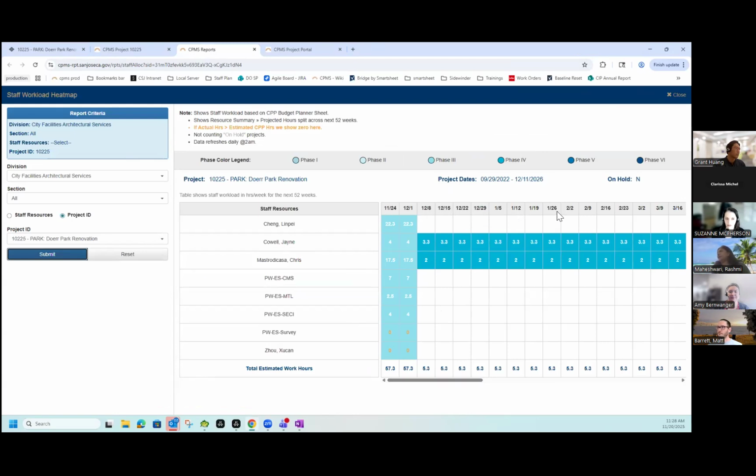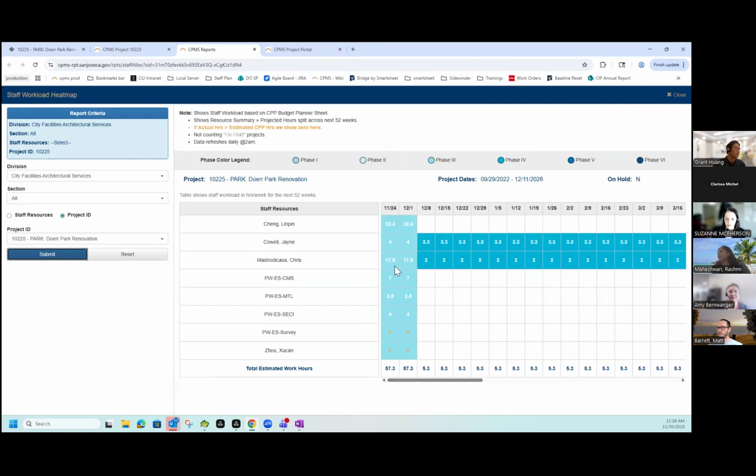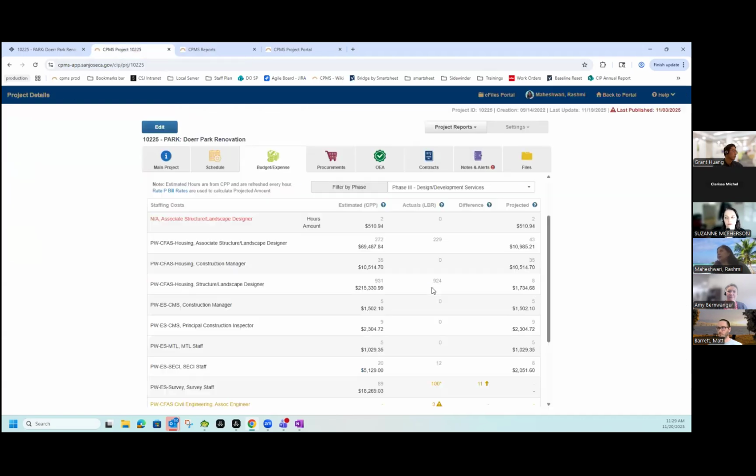It's basically breaking the next whole year into 52 weeks, and it is showing the phase. Each box is showing which phase this project is in this week, how much was estimated and how much is available now. And it splits that evenly among the remaining weeks of that phase. That's how we give the hours per week to show the workload, what is involved and what is there.